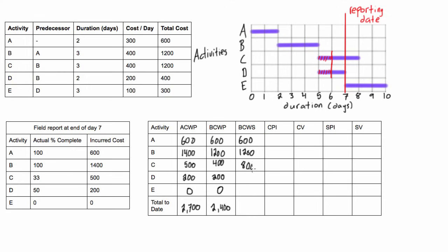Activity D was expected to be completely done by end of day seven. At $200 per day for two days, the total budgeted cost is $400, so BCWS for activity D is $400. Activity E has zero scheduled spend. Adding all of these together, the total budgeted cost of work scheduled is $3,000 — meaning if the plan had gone according to schedule, we would have spent $3,000 by end of day seven.